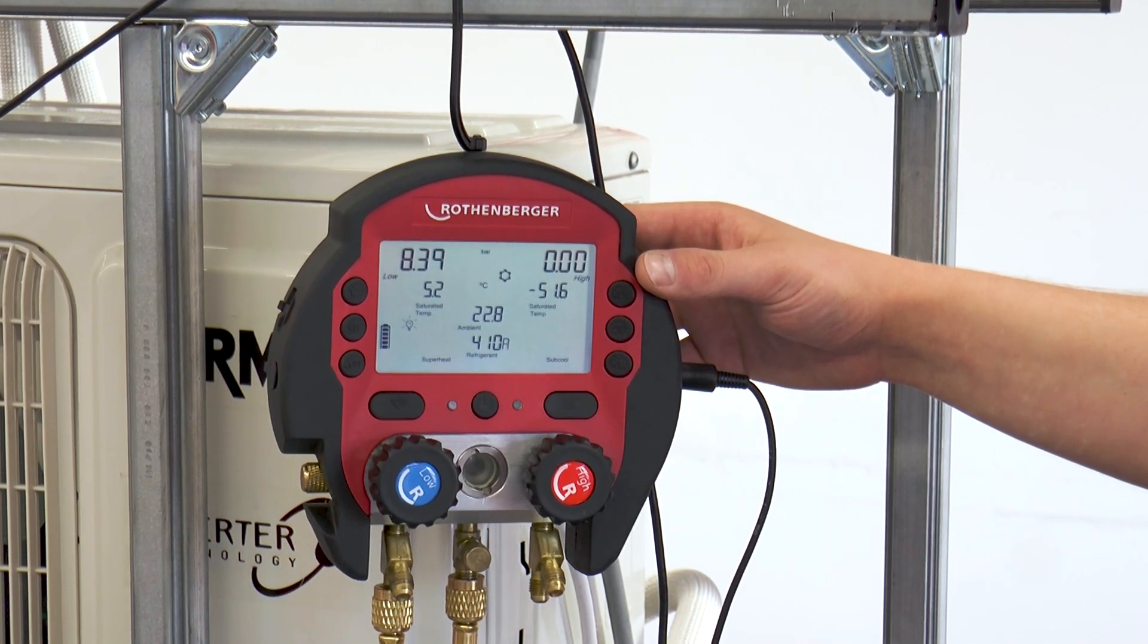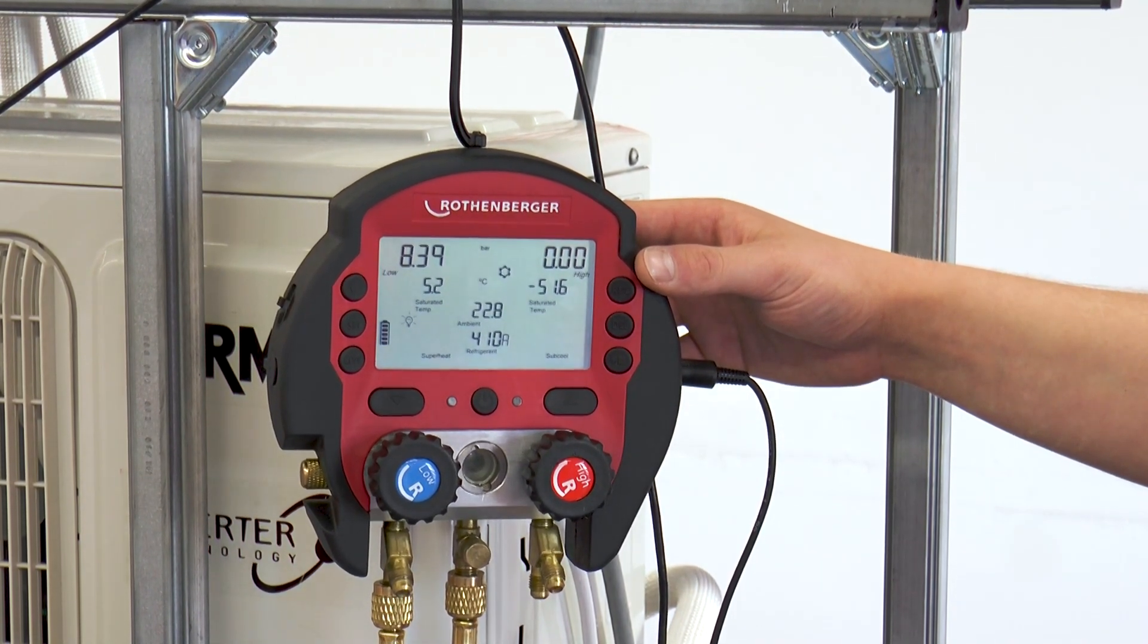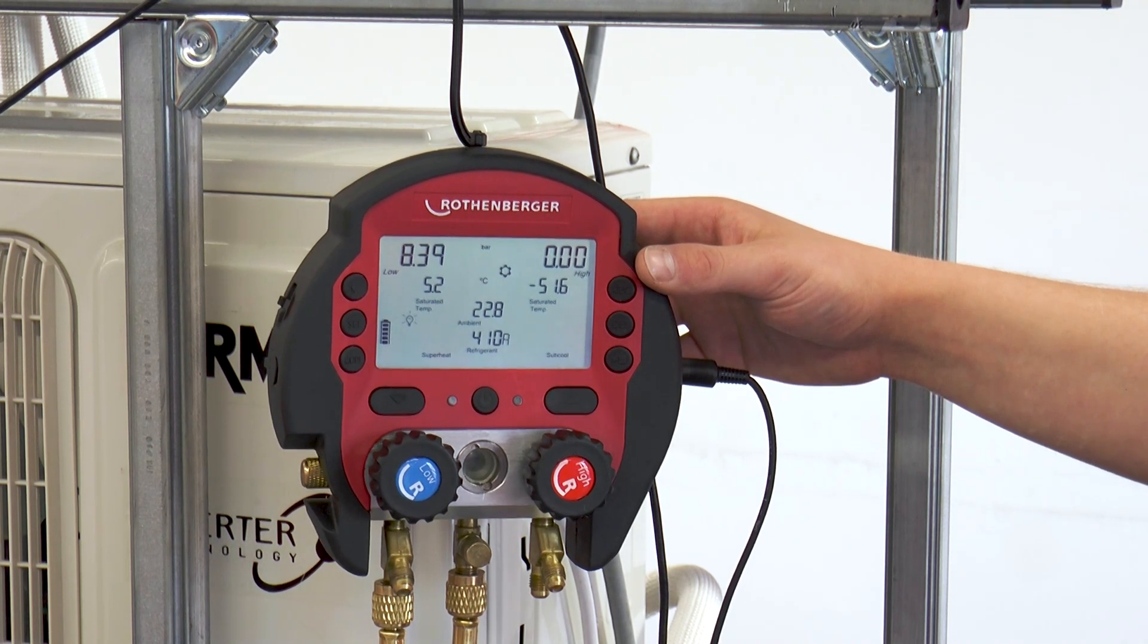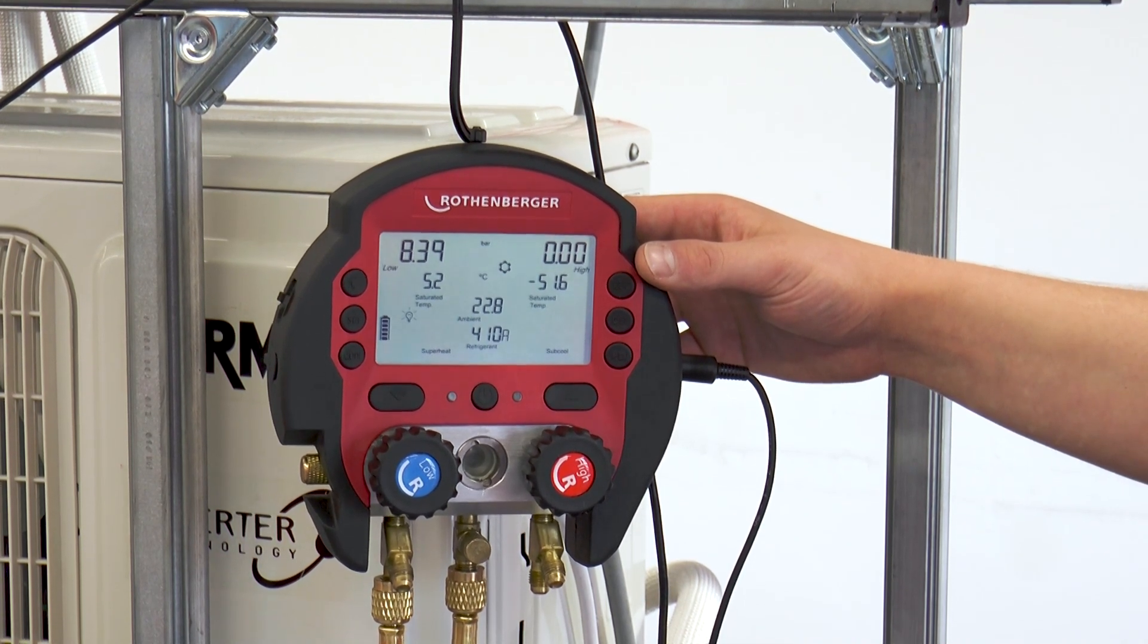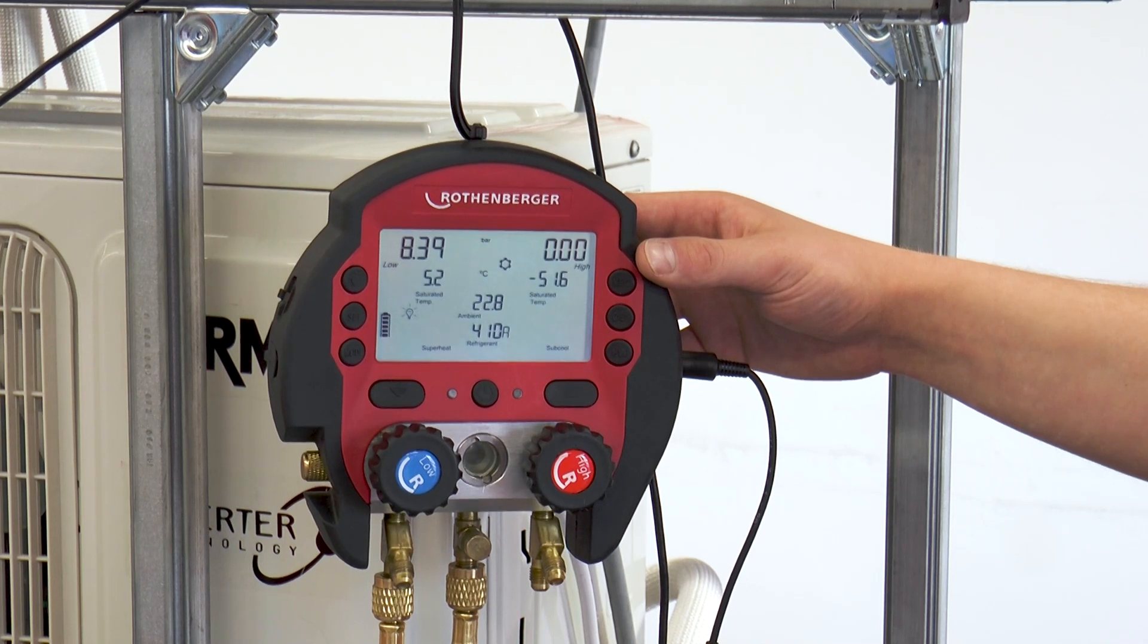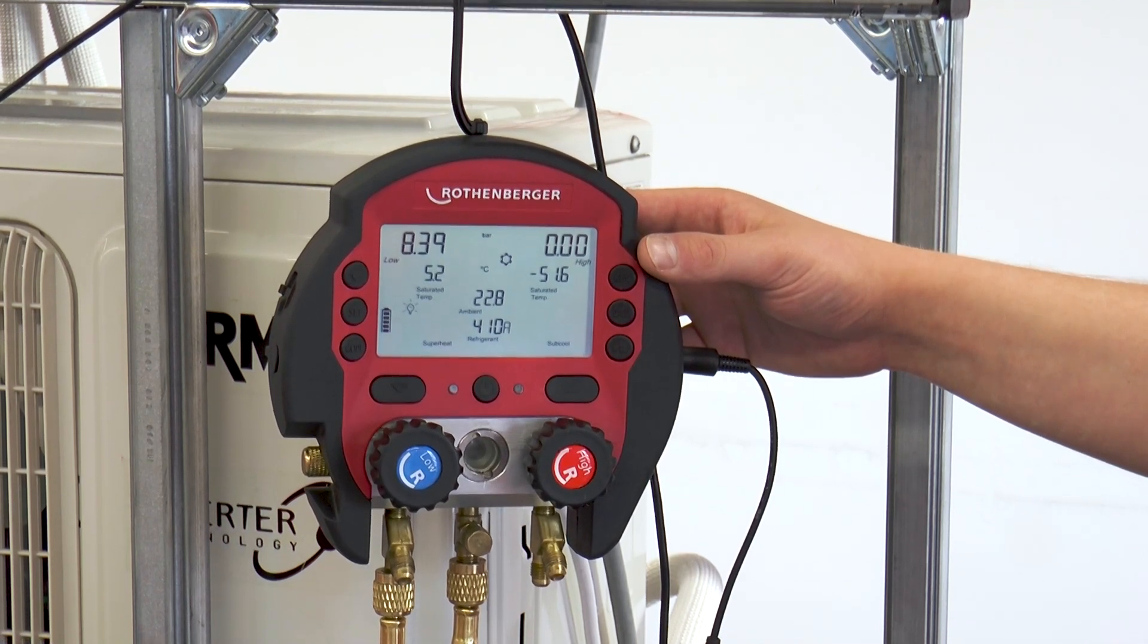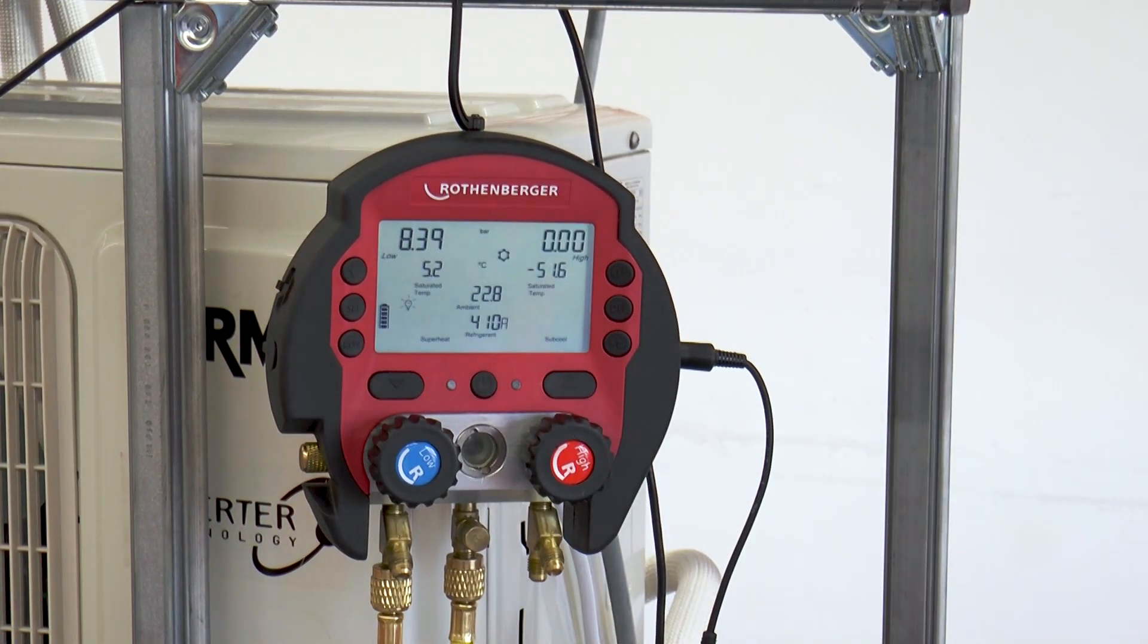The leak test is performed for approximately 60 minutes, unless otherwise specified by the manufacturer. Please refer to the manufacturer's installation instructions. If this specifies a longer period, the leak test must be carried out over this period at least.